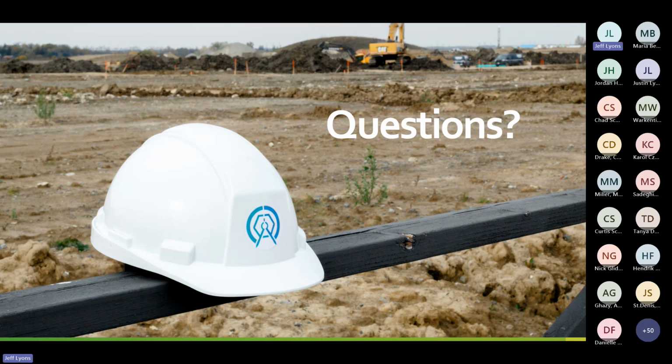Yeah, there is. So basically when you create a new project and a new bid, as you're dragging and dropping, it's looking to the database for cost data. And if you're just starting with it and you only have a brand new project, you're not going to get much result. That's when you have to basically take, say, a year's worth of bid data, and one of two ways, you can import it with Excel.